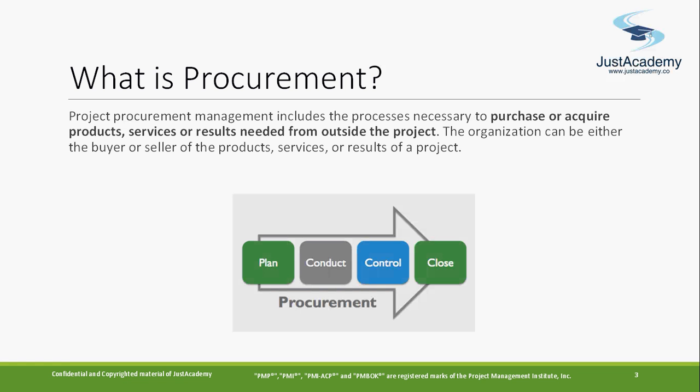At what phase you need what equipment, and which vendors can provide those things, needs to be planned properly and monitored, because it adds expenses whenever the resources are in the project but you are not using them. So you should monitor their performance. If it is not needed, go ahead and release it. Return that equipment if you rented it, and if you already purchased it, just make sure that it has been utilized properly.